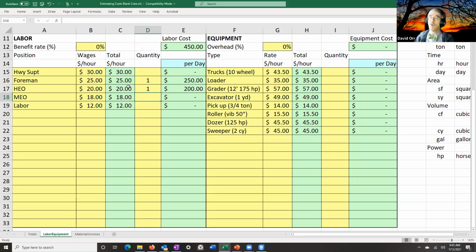Just your own. And there's some arguments that can be made for that. But if you are trading with somebody else and later on your 2 trucks are going to their municipality so they can do some work, I usually like to put in the total including what I'm borrowing, because later on your crews are going to be somewhere else and they're not available to you. And so you have to account for that fact, because that's the real cost if you think about it. Now, your budgetary cost could be smaller. If you wanted to, you could actually come in here and say that I'm going to borrow these.